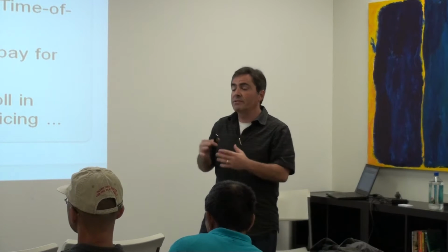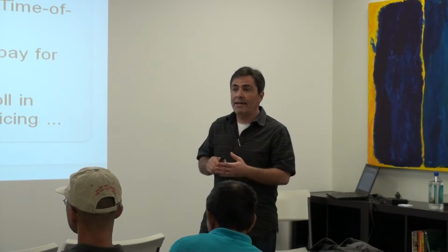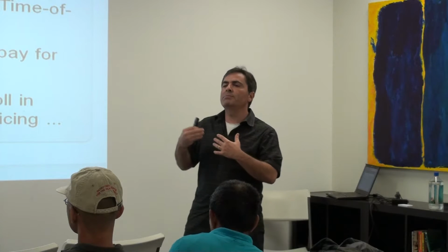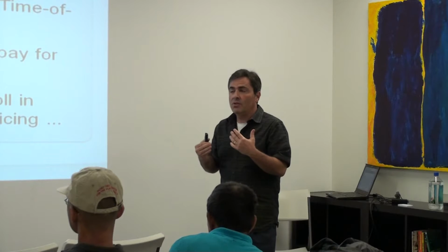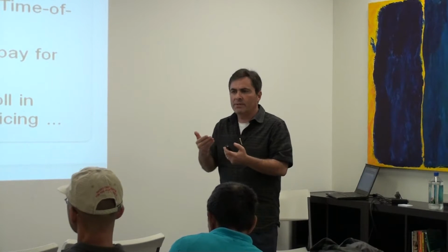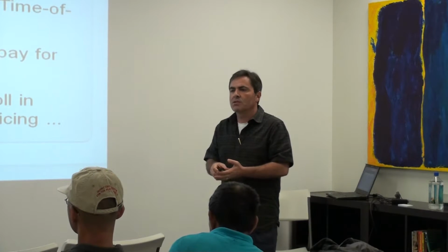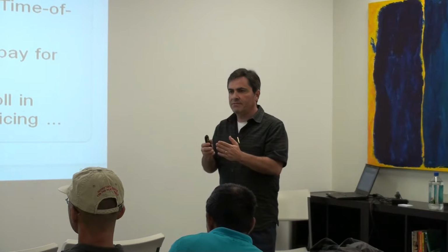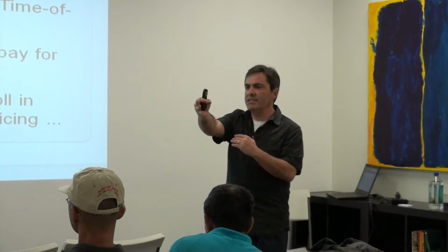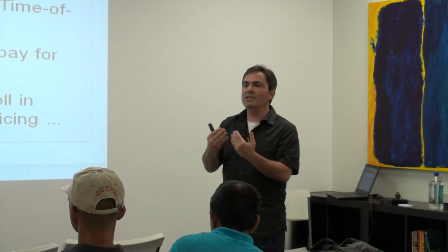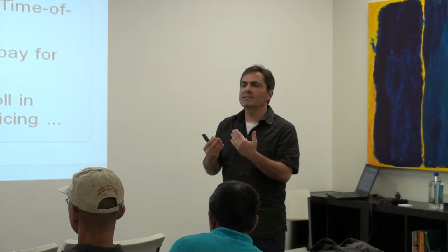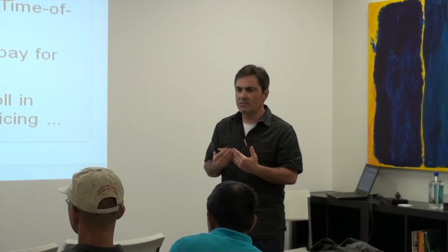So one of the things is there's actually a lot of techniques of dealing with external entities. If I'm building the UI and I'm not going to build the gateway code, but my code needs to now interact with the gateway code, one of the techniques that's used is, at the release planning, if your team's going to build the gateway interaction and I'm going to build the UI, we agree on the contract. What is that web service call that I'm going to make to you?